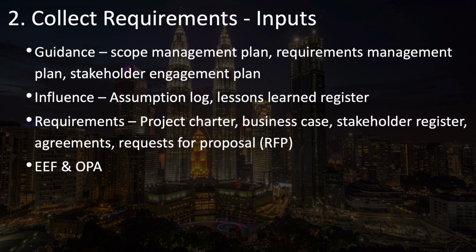Also, the business case will help provide some context of the business need and options that were considered and the recommendation for the project. The stakeholder register will also include some early requirements that have been identified by the stakeholders that you've identified so far, and it will have a list of the key stakeholders that you need to consult with.